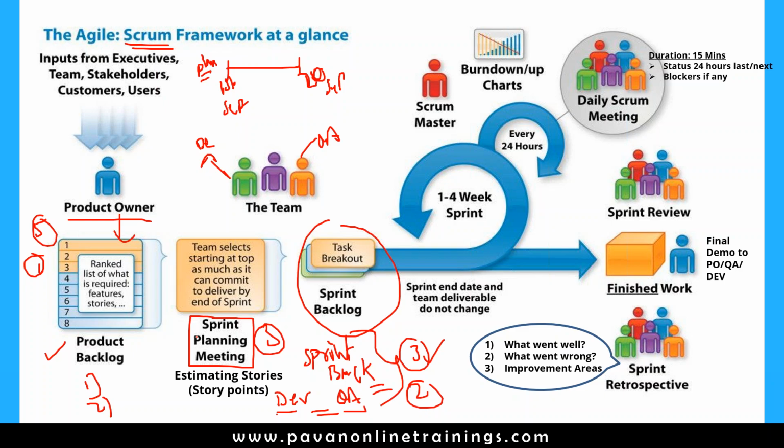And what are the tester tasks for that particular story? He has to understand the story, prepare the test data, prepare the test scenarios, test cases, and make the test environment ready, okay, and then build deployment, execution, functional testing, retesting, bug reporting, okay. All these things come under the tester tasks. So for every story, the developer will define their own tasks and the tester will define their own tasks.